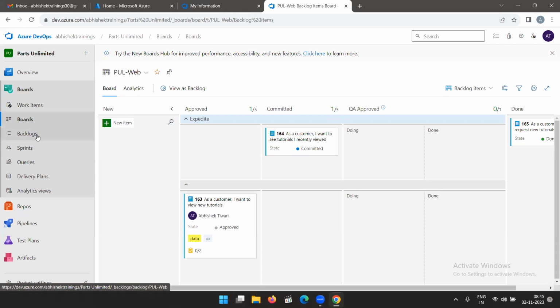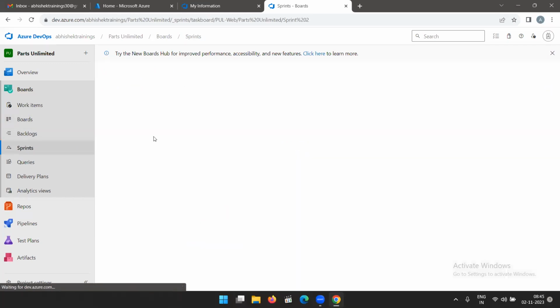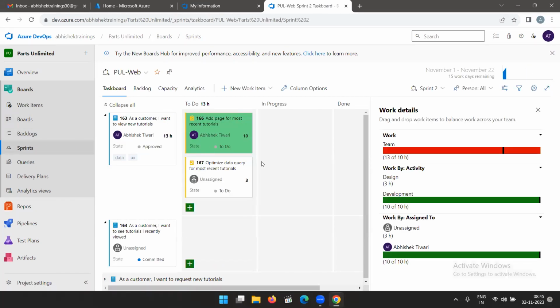No, it's in sprints. Okay, how many hours? How to update that, Abhishek? So here, yeah, that green, directly you can update. So how many hours worked. See, as the day passes, this will be updated here. Like if Monday is passed, it will reduce 1 hour out of that. Okay, you have done 1 hour of work. Okay, like this.